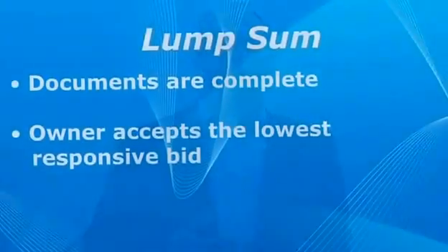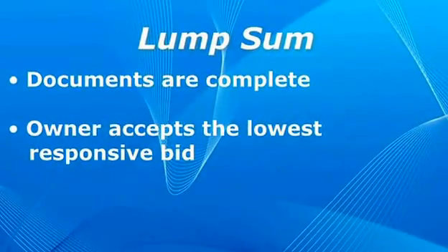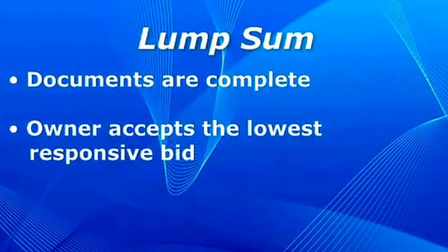Lump sum, as far as a delivery model is concerned, is a traditional hard bid lump sum: lowest responsive number wins the day, and you're bound to what's on the documents, and vice versa with the architect and the owner. What you see is what you get.